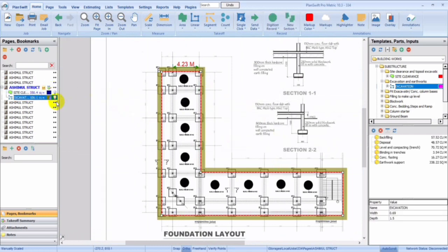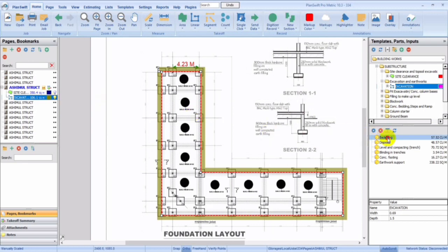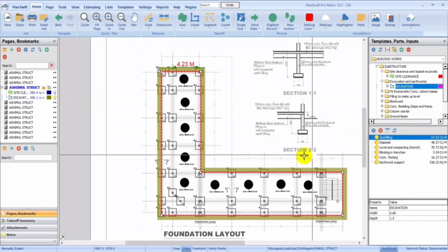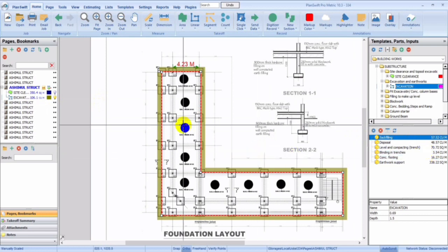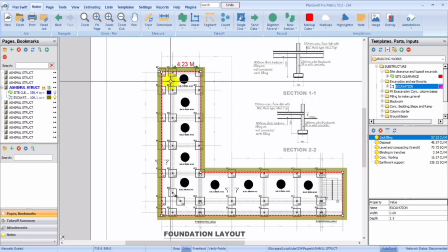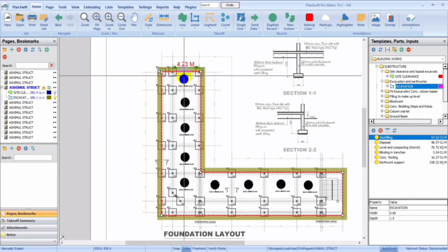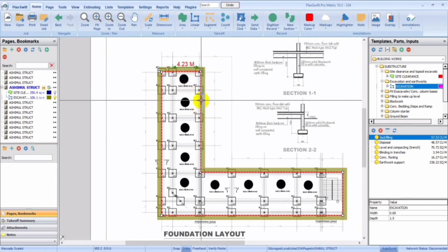Once you click here, you're already seeing everything here. Your backfilling, it'll solve it for you. Your disposal has already solved everything for you here. Disposal, backfilling, level and compacting, blinding in trenches, concrete footing, network support. So you could see that this is exactly what this template can do for you. Instead of you calculating for excavation, then you go back and calculate for disposal, you calculate again for backfilling, it has already done all of these things for you. All you have to do is just pick up these figures and input into your bill of quantities. Thank you so much.